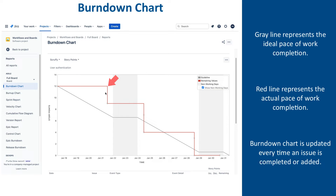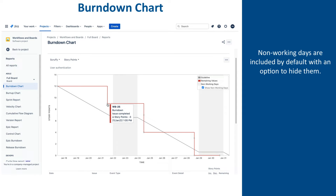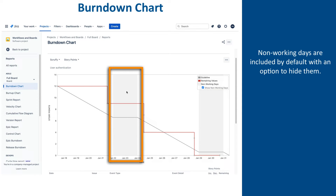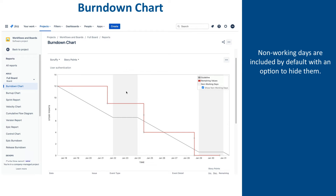Right here, on January 21, issue WB-25, which was estimated at three points, has been completed and marked done, and the red line went down those three points, indicating that there were nine points of still not completed work on that day. The diagram also indicates non-working days — weekend in this case — with gray areas, and you can see that the guideline is flat over these areas, as no work is expected to be completed on those days.